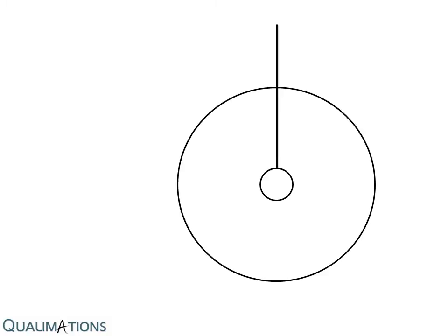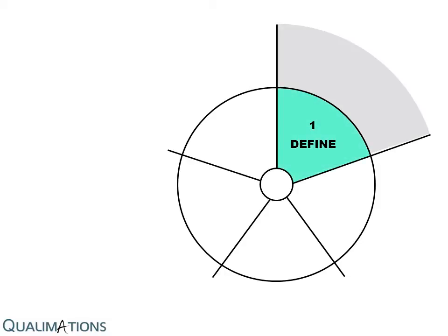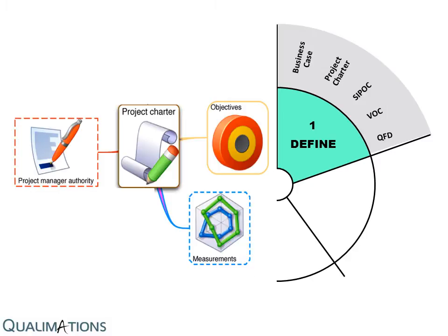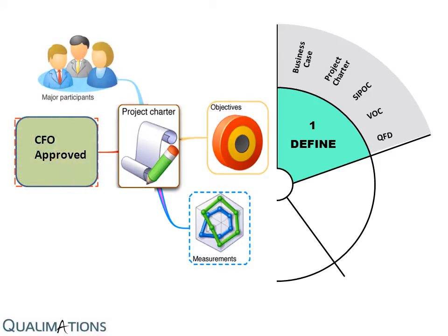The define phase is where the team begins the journey into the problem at hand. Initially, the champion determines if the problem warrants using Six Sigma methodology. It is possible that the issue can be resolved using more simple methods. The key deliverable for this phase of the DMAIC process is the project charter. The project charter document is a living document throughout the life of the project. That is, it is expected that the project charter may be revised from time to time during the project lifetime.